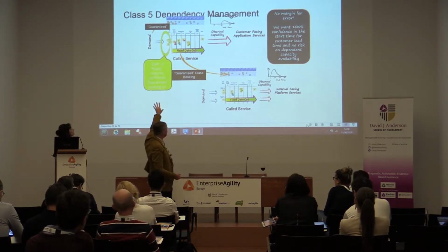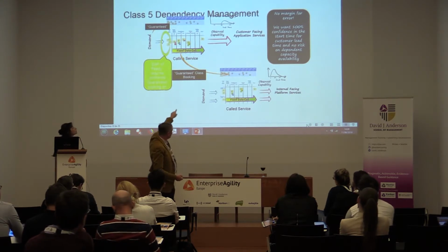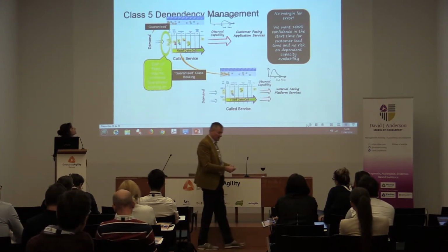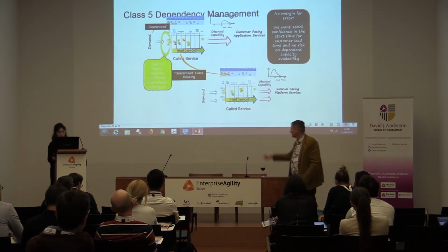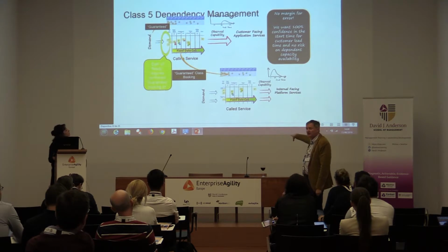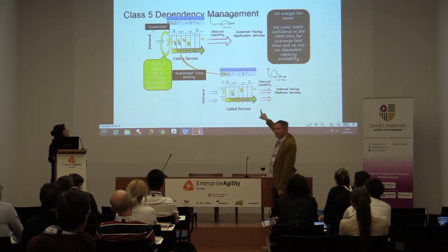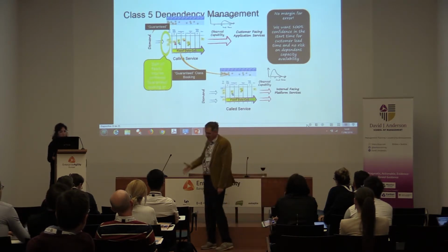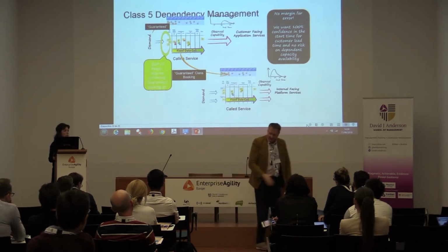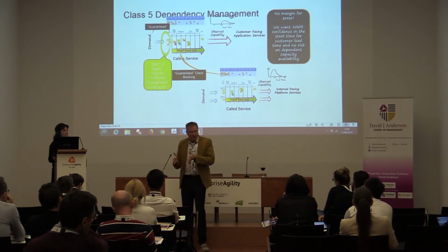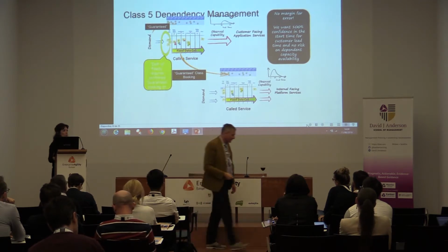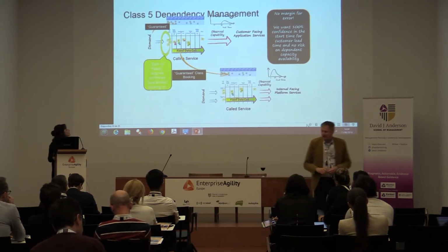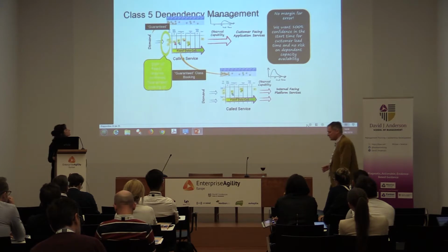So we have fixed class of service on the input, and that means that we have to cascade very high urgency, either fixed date class of service or expedite requests, into the shared services to ensure that we can hit the deadline. If there's a lead time distribution for this customer-facing service, we need to be at the left-hand end of it. You need to process it quickly. So, 5 different classes of service, different ways of doing dependency management.